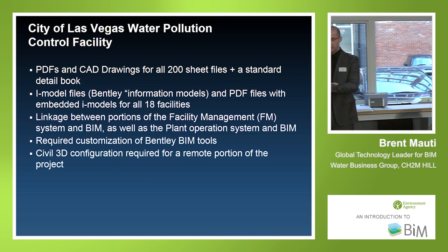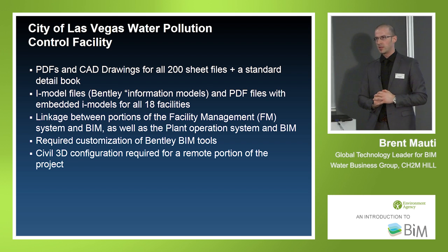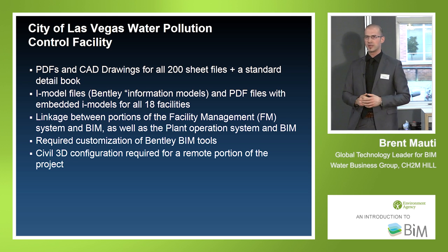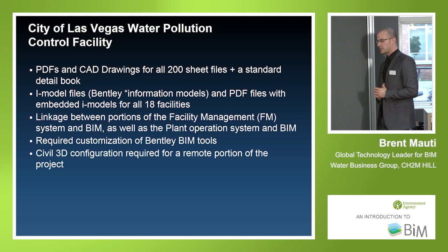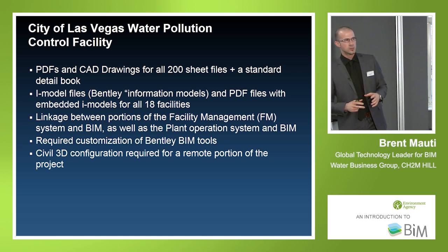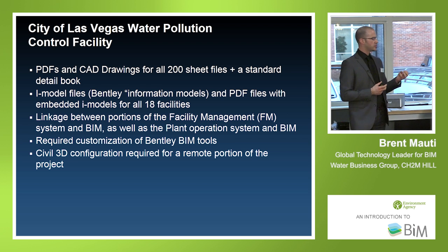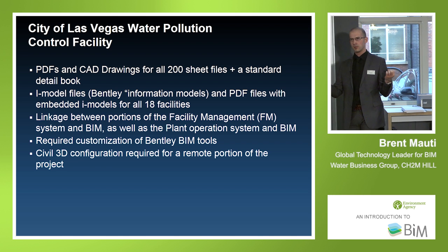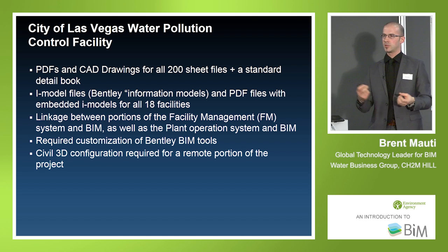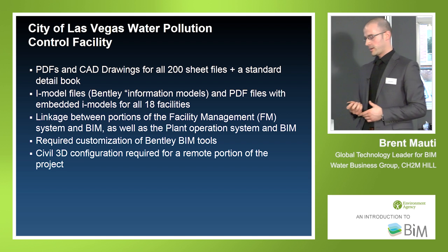So with the remaining time, I just want to chat a bit about this project. This is a wastewater treatment plant that we did in Las Vegas. Completed a couple years ago, started maybe in about the 2008 timeframe. It was a Bentley-based project mandated by the client, and they wanted an iModel turnover. So iModel is Bentley's version of an information model, and it essentially extracts geometry and data from Bentley tools, Revit, or SmartPlant 3D, pulls them into an iModel format, and delivers that. And that's what the client wanted.